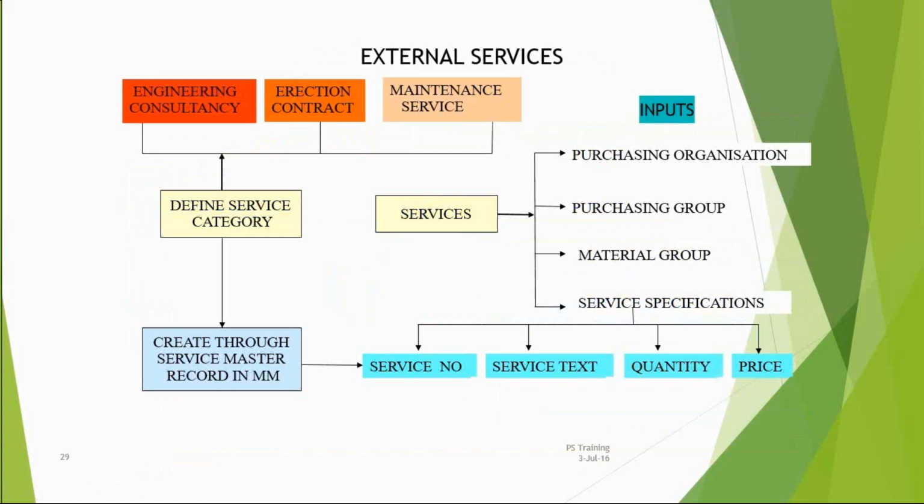If it is in project stock, it is in stock items. Till GI, it will not get populated. Only once GI happens will it get populated. When you say GI, let's say goods issue for the production order or direct delivery from projects. Okay. And up until that point, even though I've completed the goods receipt from the vendor but not the issue to the customer or to the production order, this cost would be shown as a commitment only, is it? Yes, exactly. Okay, got it.